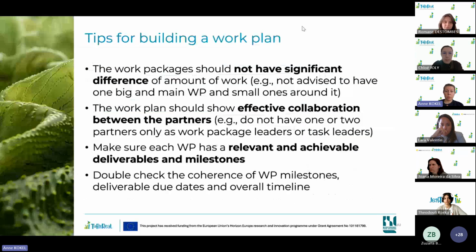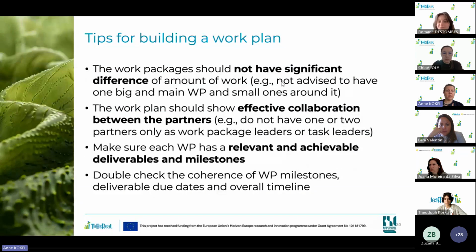So some tips to build your work plan. You should not have significant difference of amount of work. For instance, you should not have one big and main work package and small ones around it. The work plan should also show effective collaboration between the partners. It's not advised to have one partner that's work package leader of almost all work packages. It will show that the budget will be directed towards one main partner and not the others.